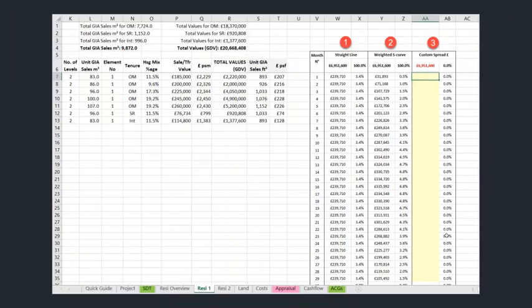If you select Custom in E12, the DVM shows you a comparison of the linear and S-curve distribution options and invites you to complete your own monthly cost distribution in column AA.